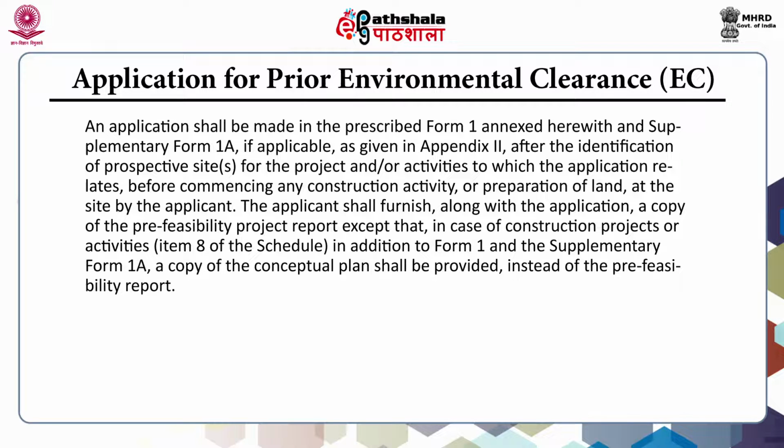The applicant shall furnish along with the application a copy of the pre-feasibility report, except that in case of construction projects or activities, that is those which are under item 8 of the schedule, in addition to Form 1 and the supplementary Form 1A, a copy of the conceptual plan shall be provided instead of the pre-feasibility report.